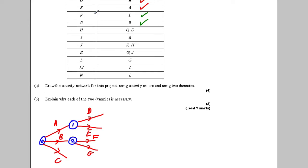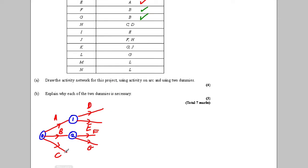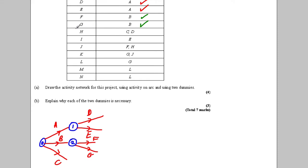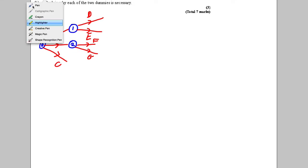H depends on C and D finishing. But C and D are very far apart from each other at the moment, so it would have been better to draw the project with C and D beside each other. I'm going to do a redraw. Also, thinking ahead: a dummy is going to be needed because K and L depend on G, but K depends on J as well.